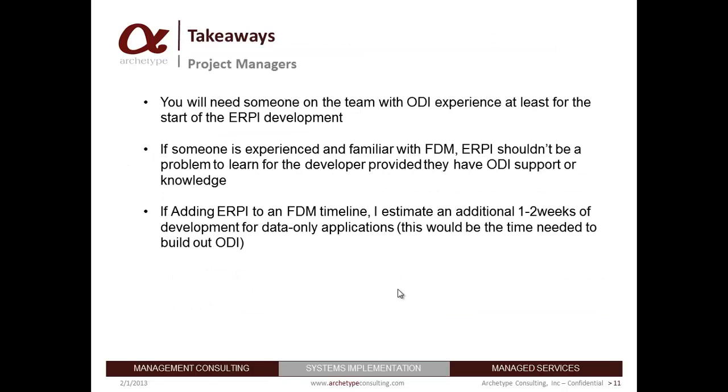So if we were to look at takeaways from the project manager perspective, one thing I actually haven't touched on very well is the fact that ERPI leverages the ODI tool as its underlying engine. And so if you were to be on a project that leverages ERPI, you would need someone with ODI experience to participate in the development to set up ERPI.